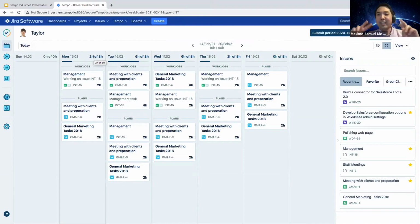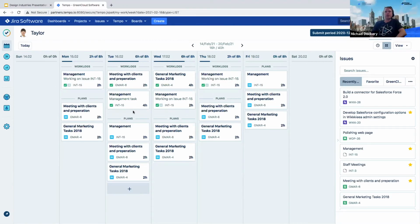Another way that you can enforce it is by making sure that, well, if it's tied to your payroll, then that really makes it a hard stop in a way. So what can happen is you can have a period that closes on a weekly basis. There's also a monthly, but in your case, you can have it on a weekly basis. So the hard stop is, at the end of the week, I believe it's something like Sunday midnight, the last week is going to be closed off. It's going to be locked. And so it's going to be impossible for a normal user to unfreeze or log time on this. So that can be super convenient to remove the idea of someone who, say, took vacation or time off last week, and then would shift it to another issue. So that would remove that.